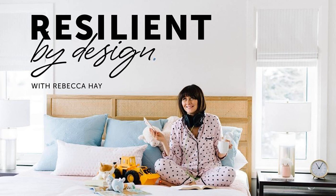We will not start demo before we've started ordering. Because, especially now, in this crazy world we're in with this pandemic and delays still happening and material shortages, it is so important that you know if you're going to have your toilet or you're going to have your tub. I mean, I just did this with my own reno.